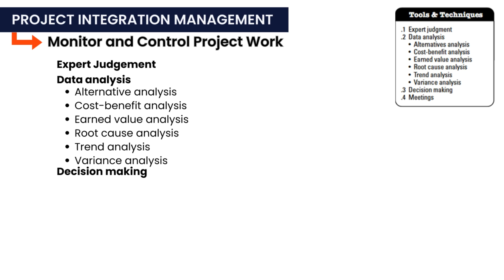The second one is multi-criteria decision analysis. This technique involves creating a table or matrix that lists various criteria and evaluating options based on those factors. For instance, a project manager might assess team members based on criteria such as availability, experience, education, and cost. Each potential candidate is rated based on these factors to make an informed decision.